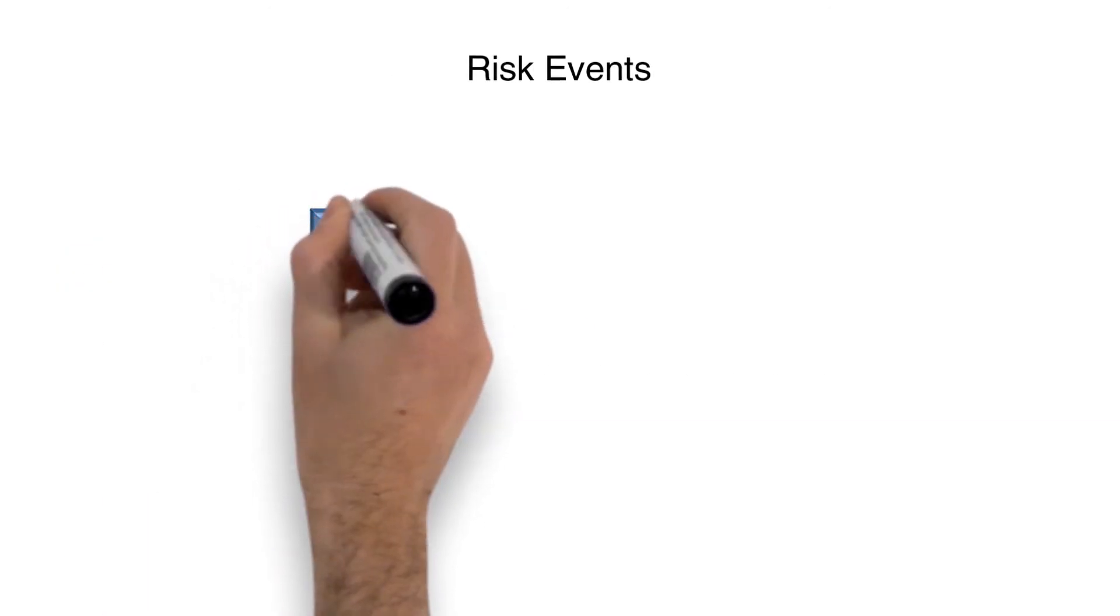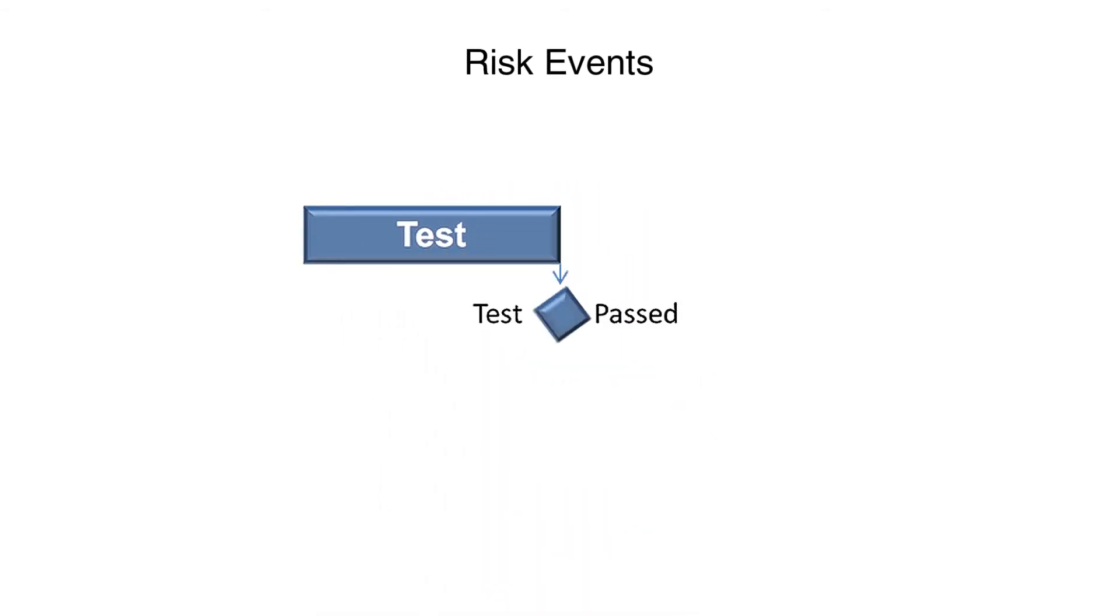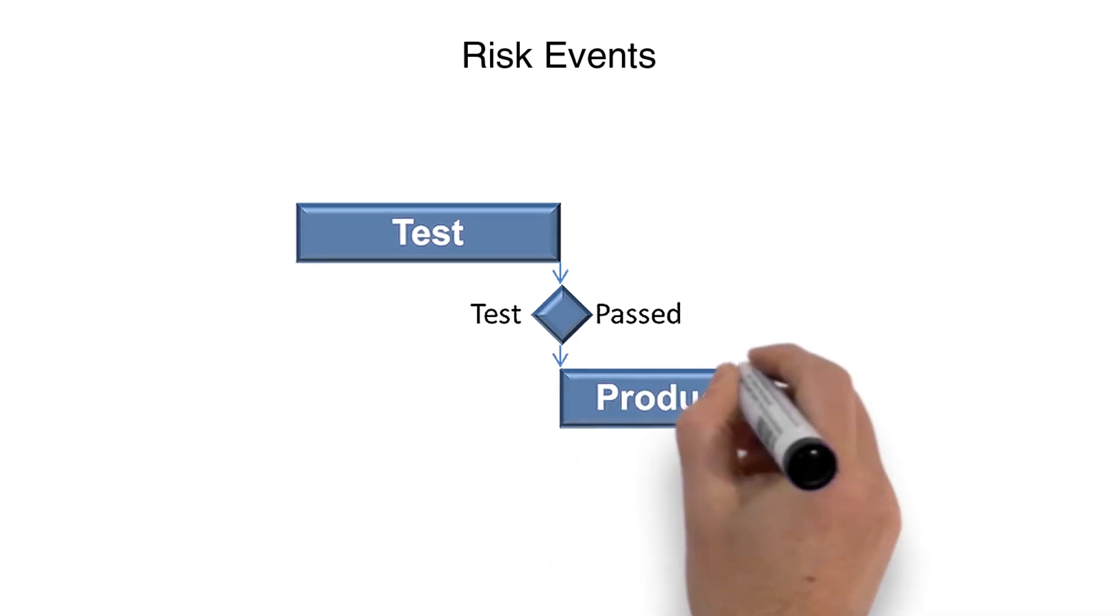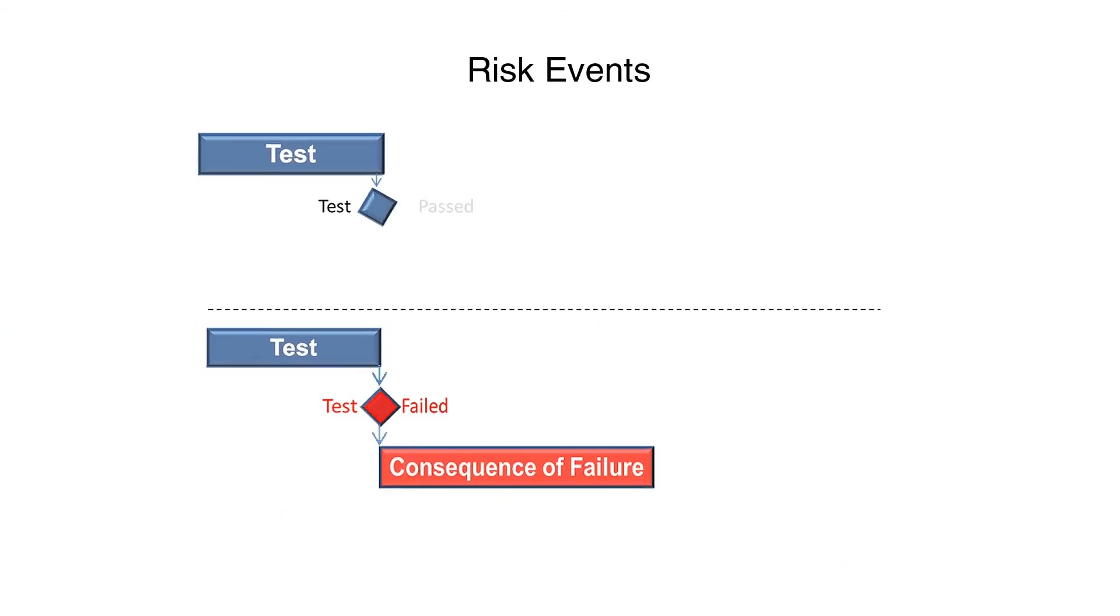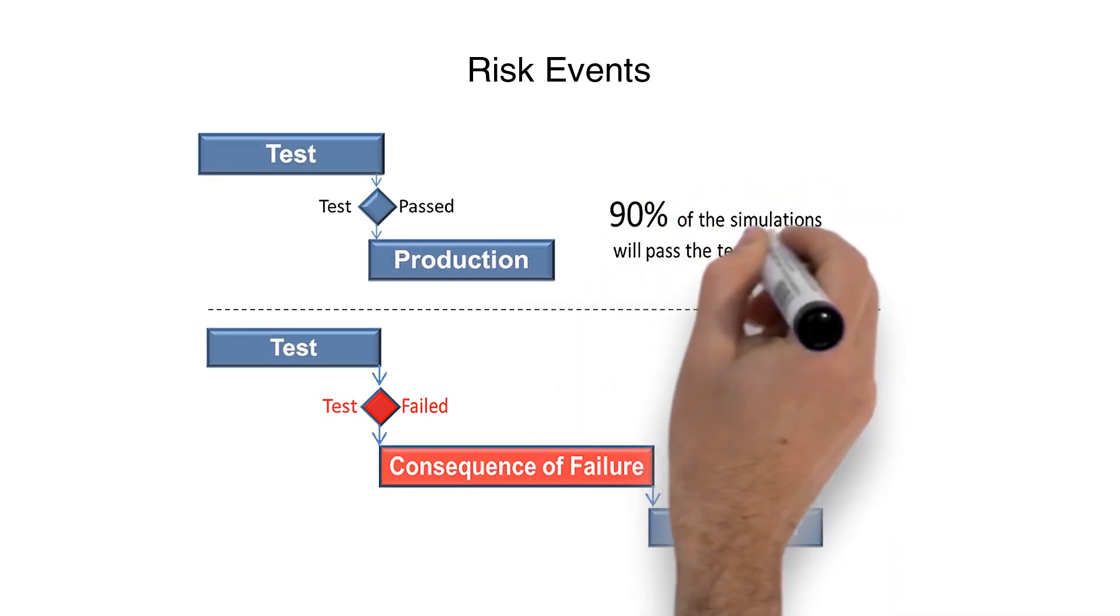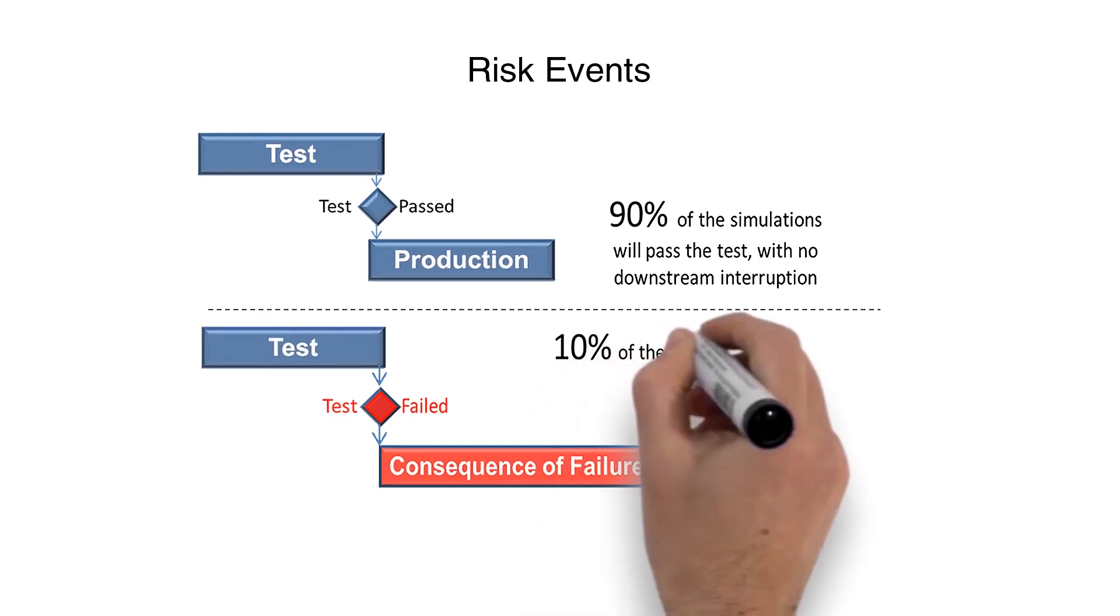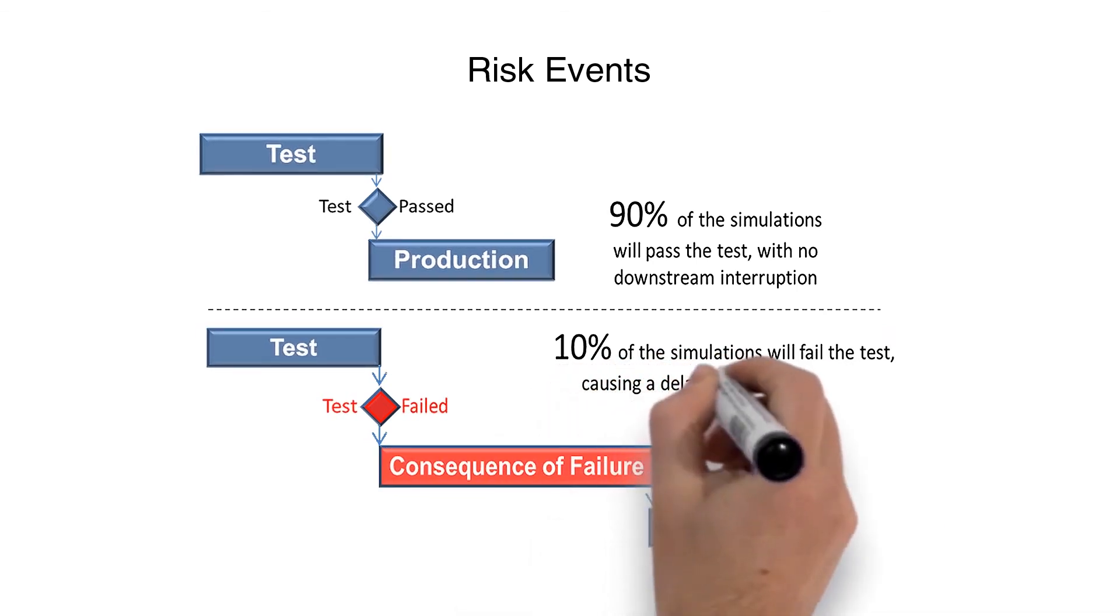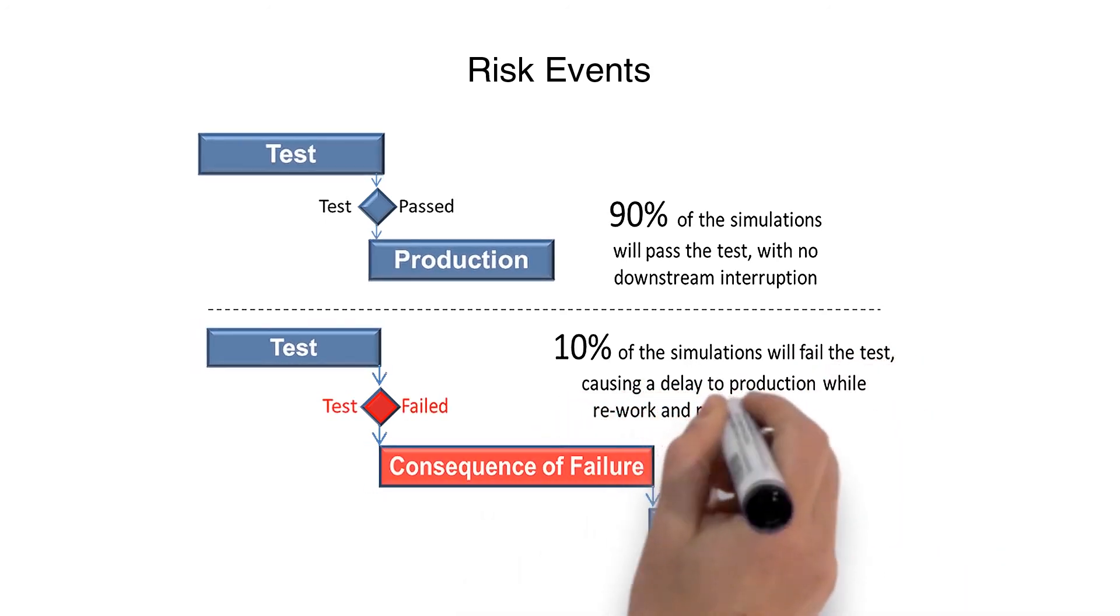Traditional Critical Path Method networks do poorly to model unexpected results. For example, if there is a 90% success rate on fatigue testing, the IMS will generally be constructed to assume the test will be successful, with no disruption to downstream tasks. But what happens if the test fails? While unlikely, there is still a very real possibility that the results will be unfavorable. If the test does return unfavorable results, there will likely be a significant delay while rework is performed in the areas of design, build, and test. A traditional CPM network can model a successful test or an unsuccessful test, but not both.